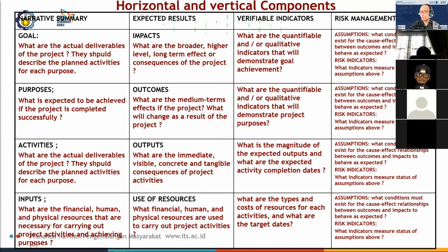And then once you've established the design of your matrix, you need to verify the logic by considering whether the inputs or the resources are relevant to the activities you're proposing, and whether the activities are relevant to the purposes, and whether your purposes are relevant to the goals.